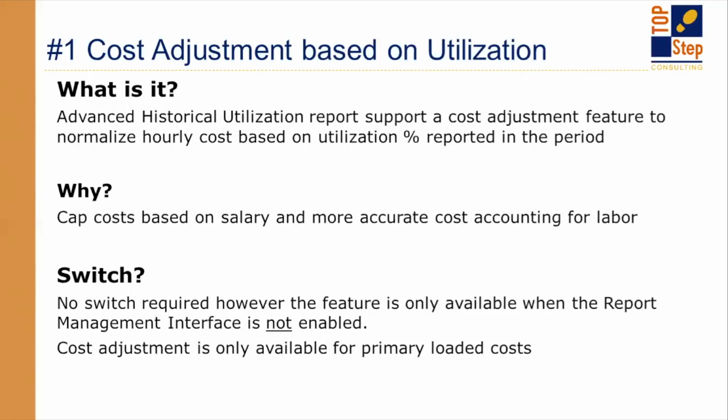And for some organizations, that is fine because they're looking for a margin value based on, if everyone worked the same week, here's what the margin would have been, okay? But of course, there's also the opposite side, that we do expect people to work a little bit over, so we want the cost to reflect the fact that we're getting some additional work for a lower cost. So we want the cost adjustment to be there so we can see closer to bottom line margin, like how much money did we actually make on this, regardless of the fact that people work really long hours on it. Okay, and that's where the cost adjustment comes in.